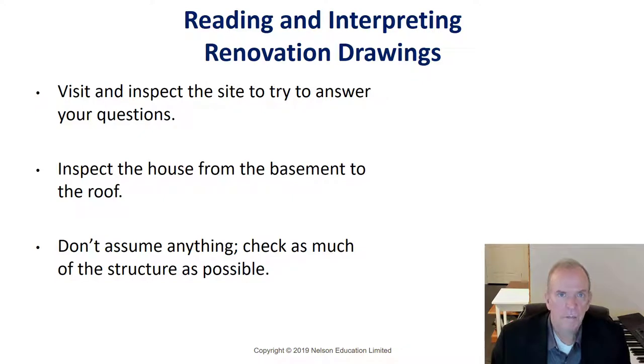for the project too. Because there's always going to be unknown unknowns, the things we don't know in renovations, but you want to minimize the unknown unknowns so that you have a reasonable amount of known unknowns, and they've been taken care of contractually, so that if there's either contingency or allowances in the contract, that if this condition occurs, this is how we're going to proceed. That can be helpful.